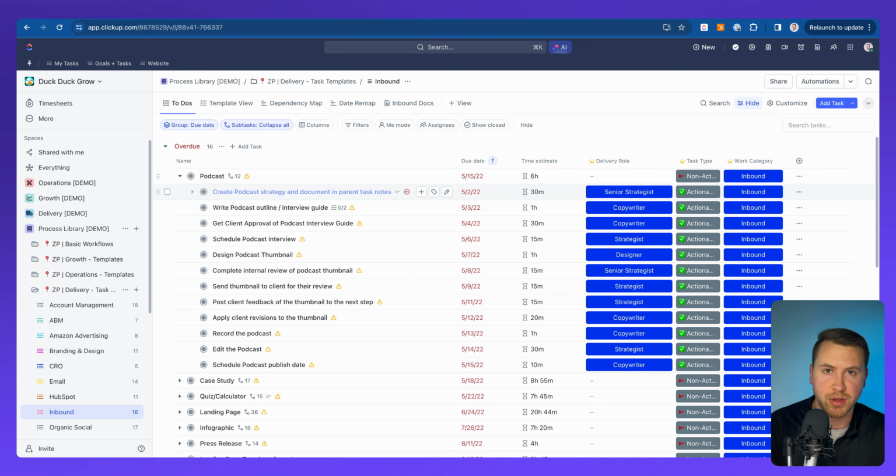If you have two people assigned to a task, what that does is no one knows who is actually in charge of it. So this is going to help with accountability. You're assigned to this task, you're in charge of it. There's not two people on there saying, hey, you might do part of this, I might do the other part of it, but what are we actually fully in charge of? That's how things slip through the cracks.